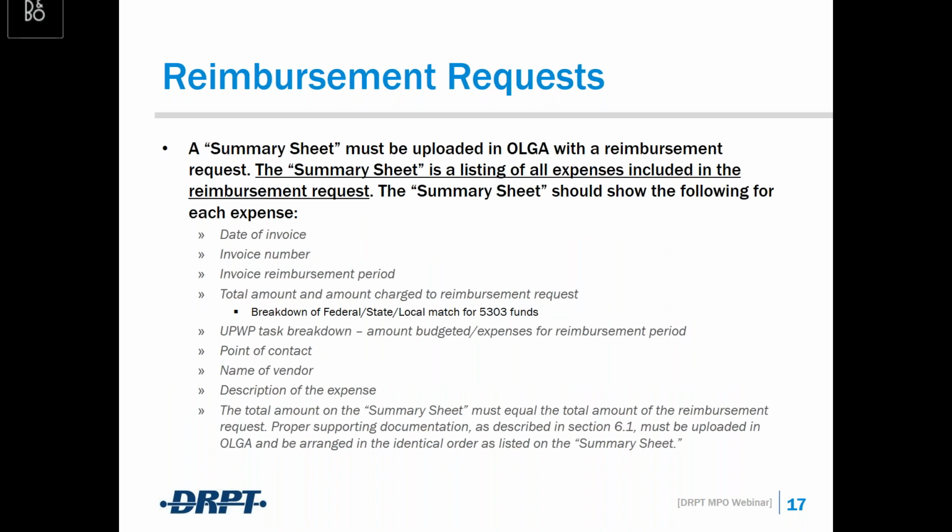So a little bit more detail on the reimbursement requests. We have had some issues in the past with receiving supporting documentation that does not include a summary sheet that describes what is attached. We do ask MPOs to include a summary sheet moving forward for all expenses included in the reimbursement request.